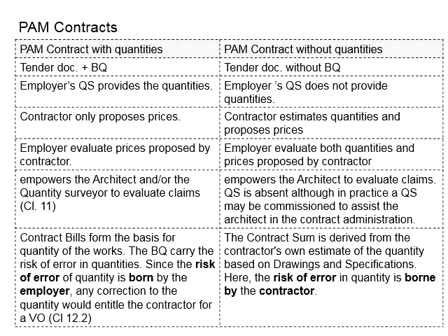the contractor. Under this mechanism, the employer has employed a quantity surveyor as the professional representing his side to work out the quantities, as well as for the purpose of evaluating the claims submitted by the contractor during the construction project. Therefore, within the terms of the contract, particularly in clause 11, the PAM contract empowers the architect and/or the quantity surveyor